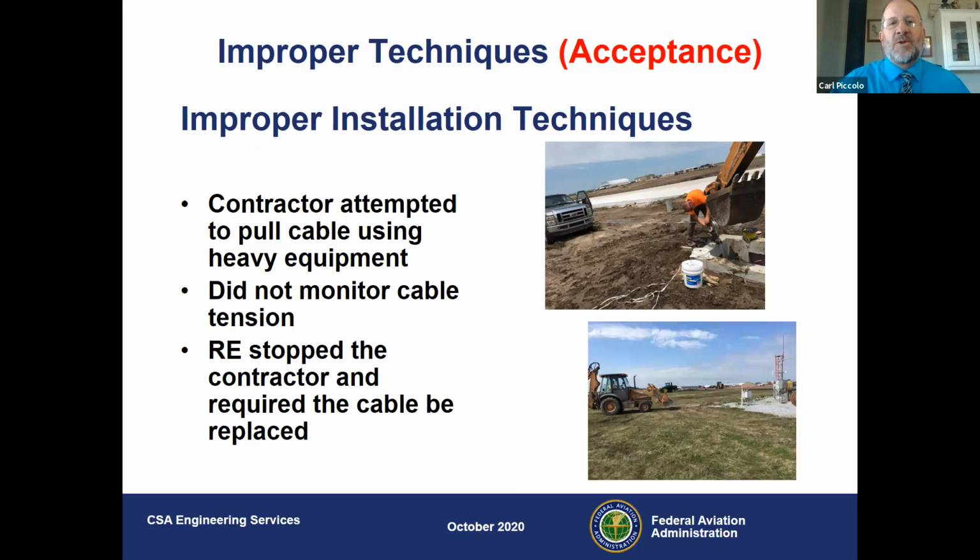He's hooked the pull cable up to his truck and he's backing it. He's trying to pull the cable through the concrete with his truck. This is in violation of one of our standards because we have to have strain meters on that cable.